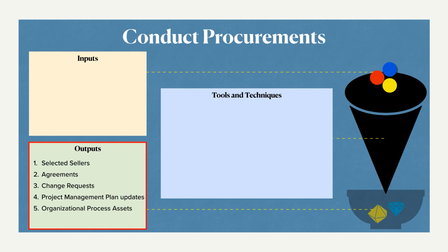And the organizational process assets. Okay, again, this is also being updated here. This is usually an input, guys, and we are considering it here as an output. Why? Because we are adding new suppliers. So the organization has a new list of suppliers after this process. That is an important organizational process asset. And sometimes if an existing supplier is deleted, that is also recorded here.